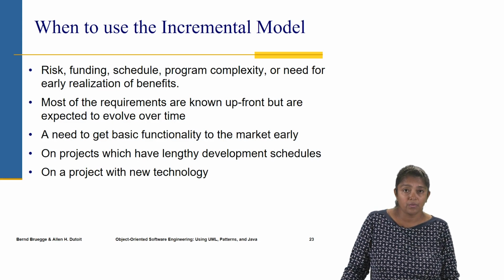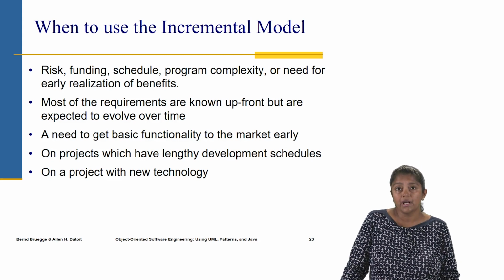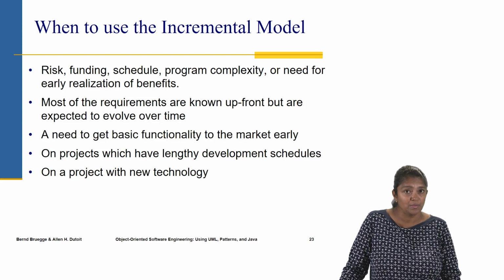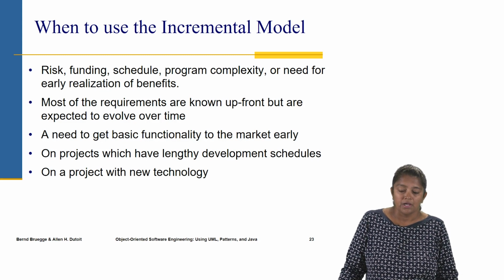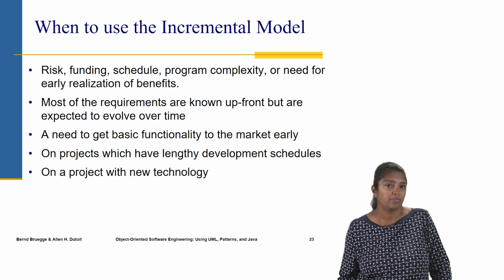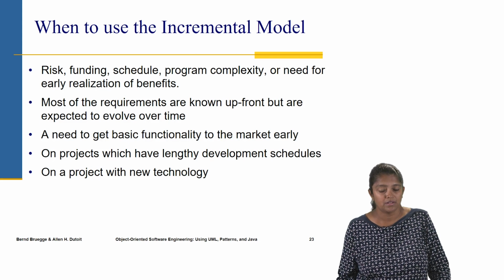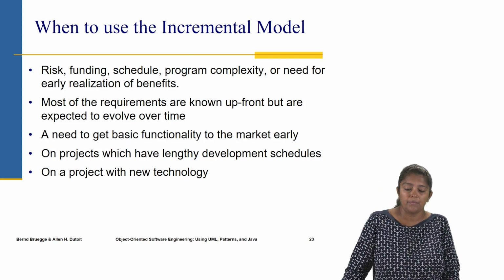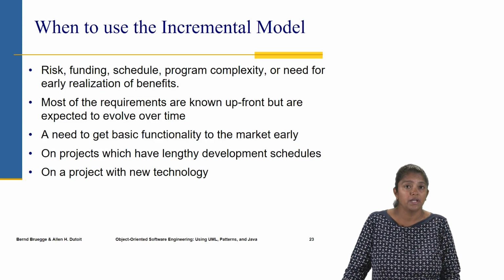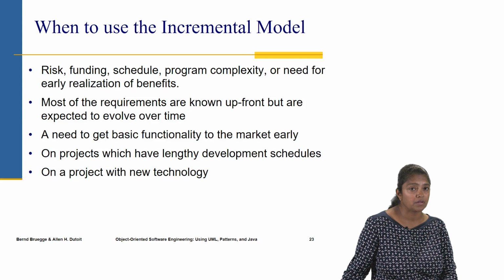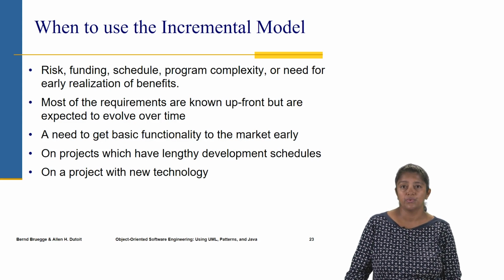Now most of the requirements still have to be known upfront here. They can evolve over time, that's okay. There's some flexibility, but the majority of the requirements have to be known upfront. If it's important to get some basic functionality to the market early, then that's another case where this kind of a model is very good. Now for projects that have lengthy development schedules, again it's a good idea to use the incremental model, so that the customer gets to see something sooner.